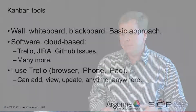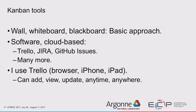There are lots of ways you can do Kanban: just a wall or a whiteboard, a blackboard — very basic. If you're all co-located, having a whiteboard with sticky notes is a very reasonable and physical, tangible approach. Then there's software-based: Trello, Jira, GitHub issues, and many more. The big question is how many tasks — it's really a personal question. Start with two or three and see how it goes. If you feel like you can have more in flight, add one more, but be cautious.